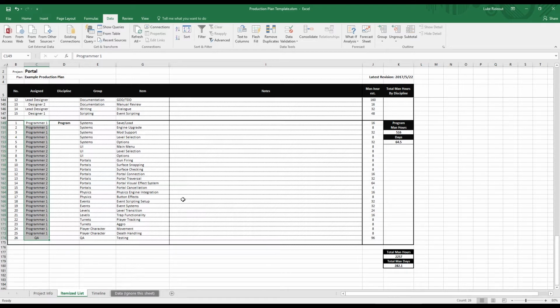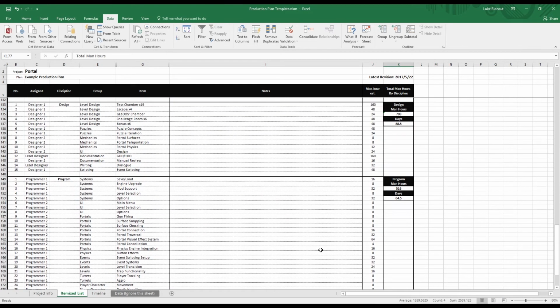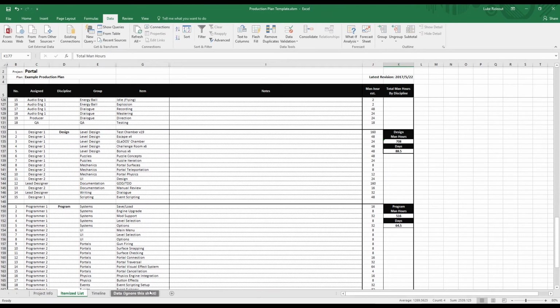This can be a few days' work, but ultimately, after each task has a man-day cost associated with it, we can see the total man-day and man-month cost on the project. This on its own is an invaluable number to be aware of, but we need to establish dependencies before we can call our schedule ready. We would need the portal gun to be done by the 3D artist before an animator can touch it, and likewise, effects frequently need to wait for animation to finish.